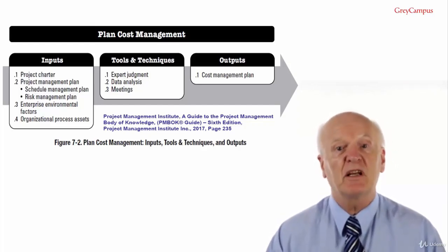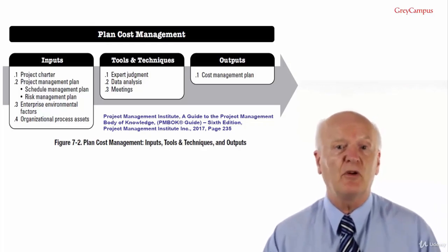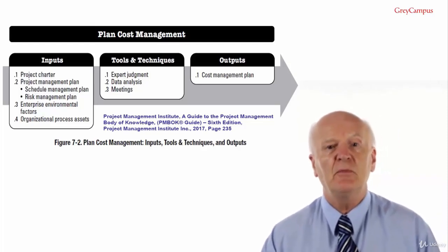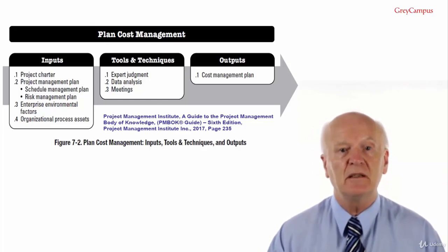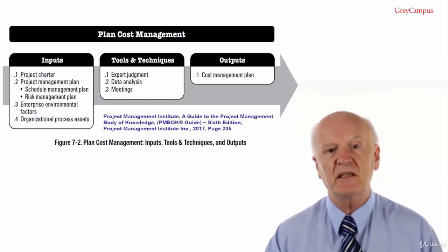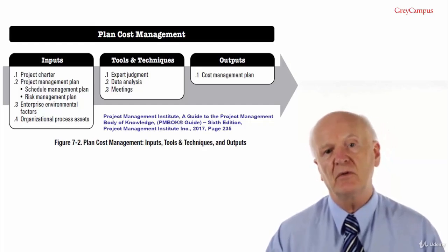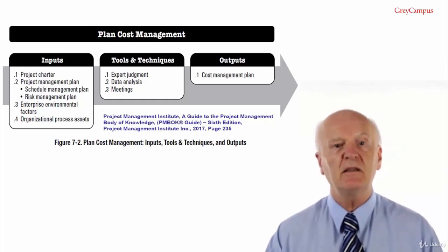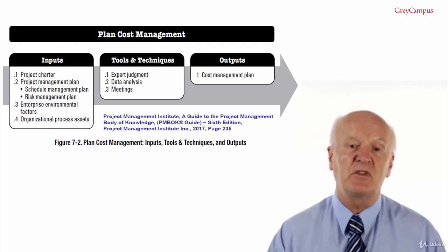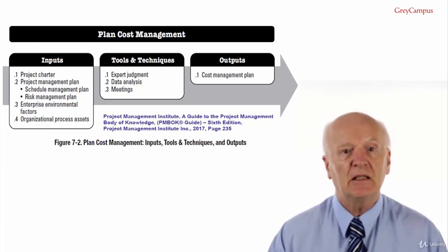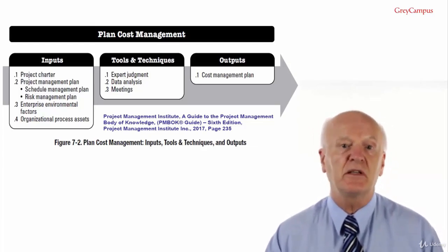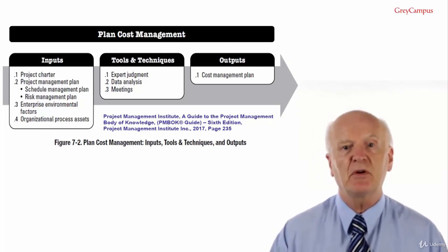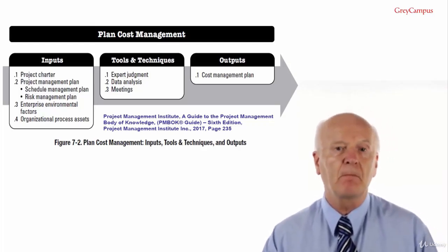Self-funding, the project funding will come directly from the performing organisation's own reserves. Funding with equity, project funding will come from obtaining a loan using corporate assets or shares as security for the loan. And funding with debt, project funding will be raised by obtaining a loan without asset backing, which is usually more expensive. It can also include considerations of ways to acquire project resources, such as making, purchasing, renting or leasing.